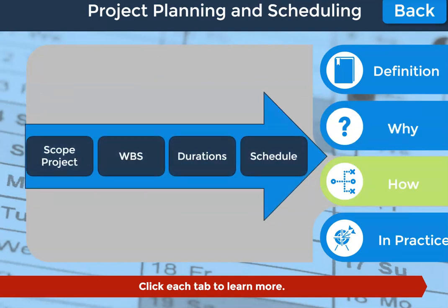In order to develop robust schedules, a four-stage process is used. Firstly, the scope of the project is defined in the project management plan. The team review the project scope and identify all the sub-tasks that will deliver the project outlined in the scope. The work breakdown structure, usually shortened to WBS, is used to break projects down into manageable work packages that will provide the deliverables. It is the start of the planning process and is often called the foundation of project planning. Most project professionals recognize the importance and benefits of a work breakdown structure in outperforming projects without one.